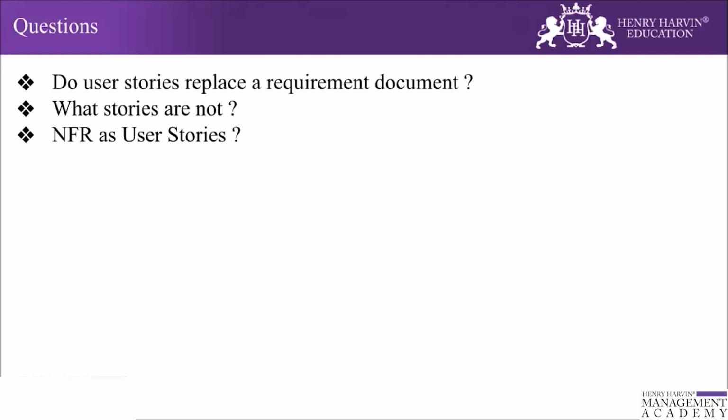This is a big topic, and I can probably cover it in another short lesson, but a defect can be written as a user story, and it can become a part of the product backlog. If a severe defect is raised, it will be rewritten as a user story, go to the product backlog, be prioritized by the product owner and the team, and then be taken into the next sprint.